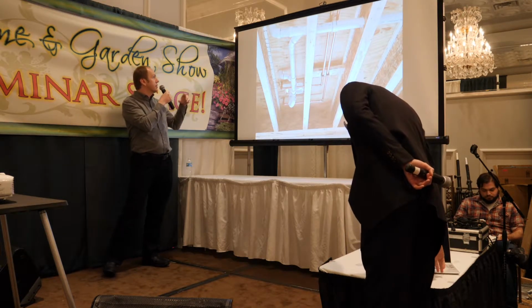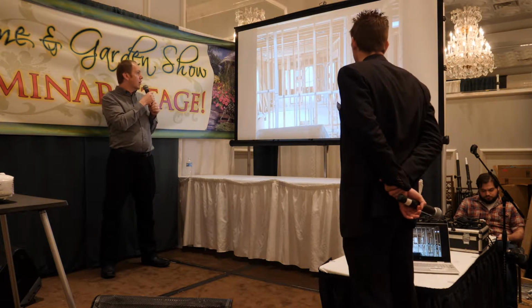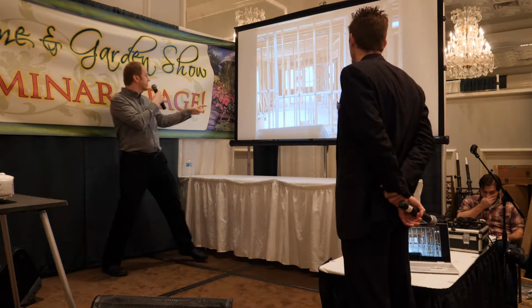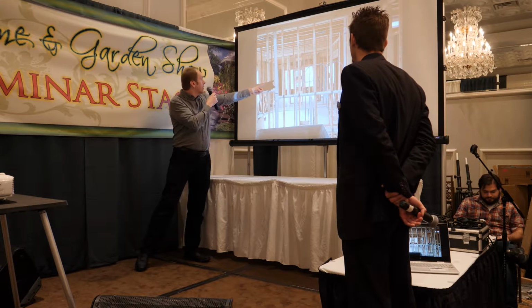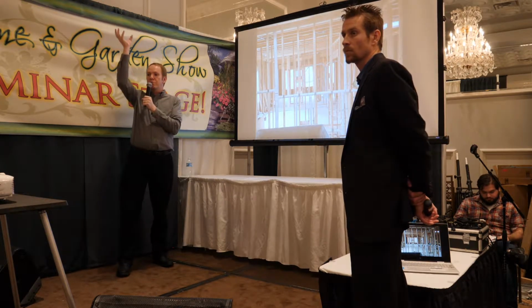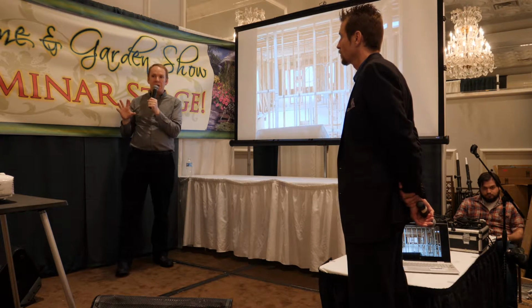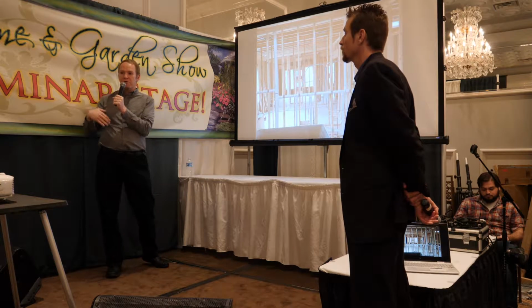And here you can see some of the plumbing, the waste lines, the supply lines. We got electrical, waste, and this is the plumbing stack here. So you've already got your roof on, but the plumber needs to go through and put the stack through the roof. That's okay. So one of the things we recommend is don't pay your roofer the full amount yet.